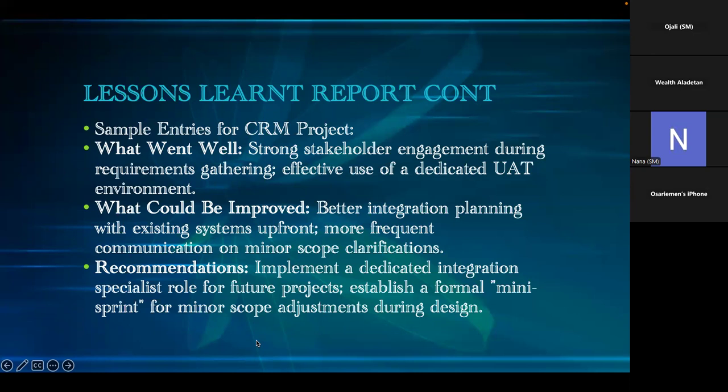And then what are our recommendations? You need to implement a dedicated integration specialist role for future projects. Establish a formal mini sprint for minor scope adjustment during design. So these are recommendations that people brought up after they've completed the project.